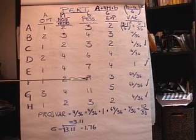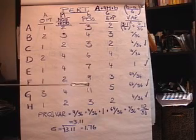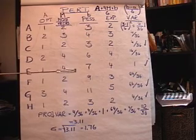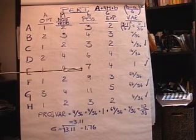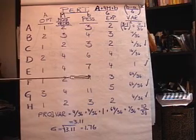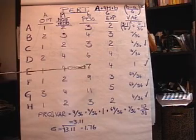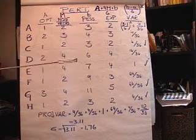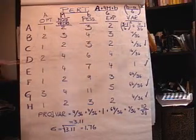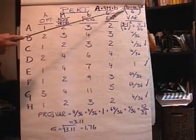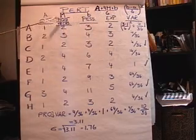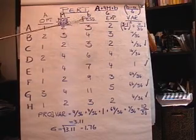The next thing we'd like to do then is calculate some probabilities. Say we're interested in the probability of completing this project within sixteen days. We know the expected time is fifteen, but let's say that we need to really get this done within sixteen days. What's the probability? Well what we can do is calculate the variance for each activity. The variance formula up here is B minus A divided by six squared. So it's the pessimistic minus the optimistic over six squared.